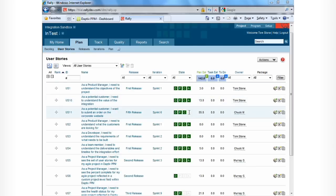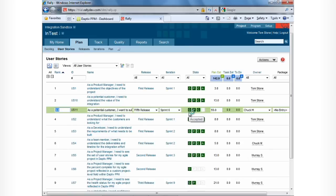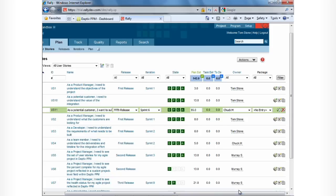Let's go ahead and update one of these stories and mark it as accepted. We can see it's a large story, 55 story points, so that will increase our percentage complete for this project.